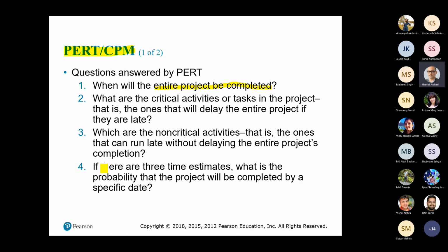For example, you have an excavation machine, and today you know that the non-critical activity can be delayed up to 2 days. So you will use that excavation machine for another activity which is on the critical path. Okay, so that's the property of knowing what are critical activities and what are non-critical activities.